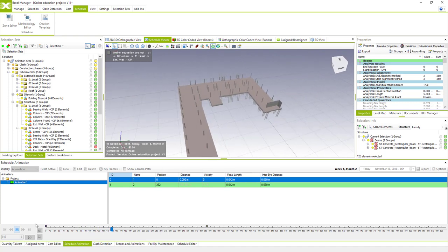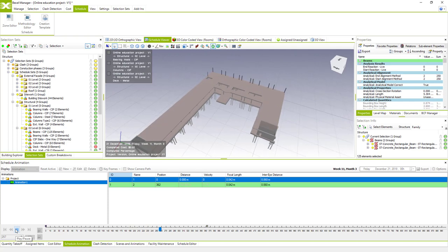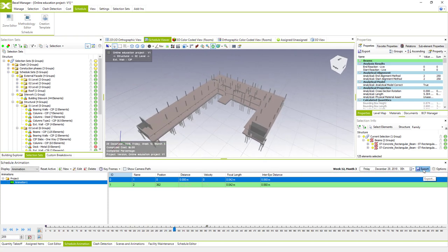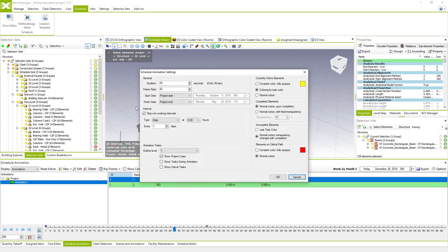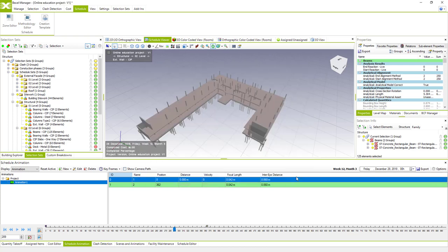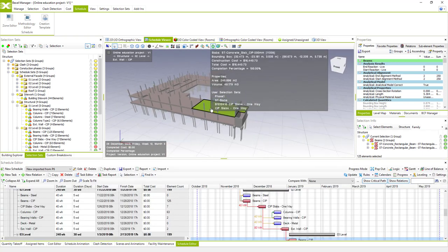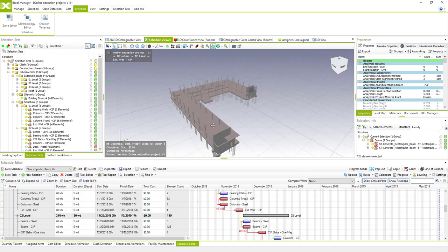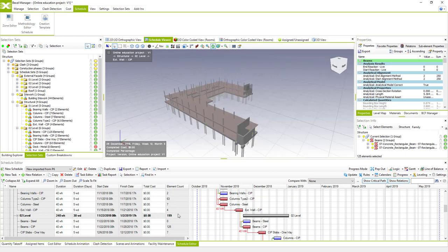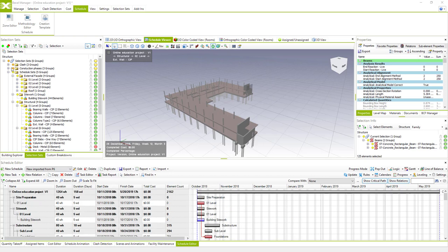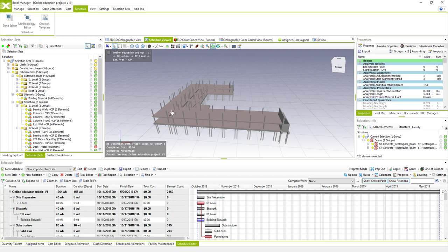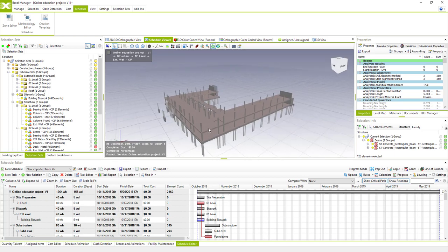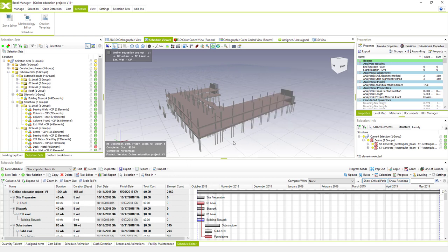When we set it to active and play it, the camera is actually moving around the building while the simulation is executing. All these simulations can be exported into videos or sets of images, and of course we have a lot of different options for each of these settings. Basically this is the way to link your BIM model elements with the imported schedule and how to create a 4D simulation from the imported schedule.